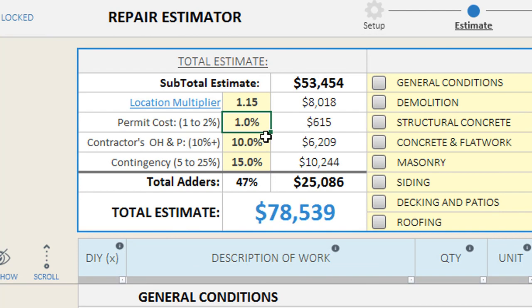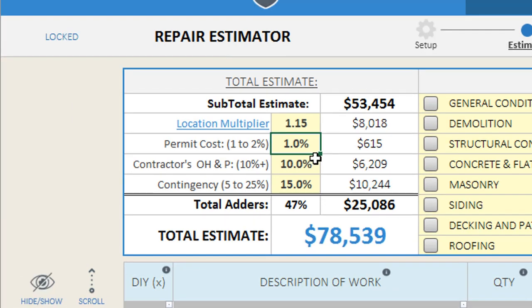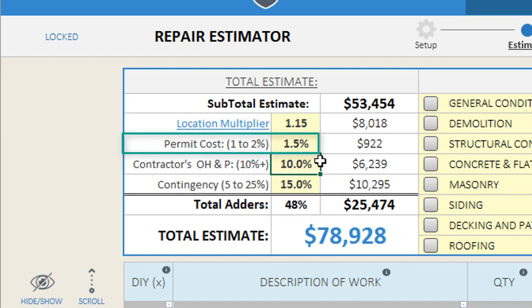Our permits feature allows you to include permit costs based upon a percentage of the overall project value. Generally, permit costs will run about one to two percent of the project value, so you can plug in a percentage amount to quickly calculate your rough permit costs for your project.